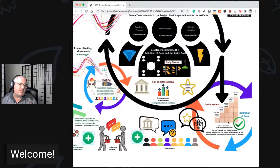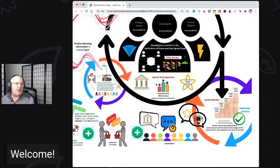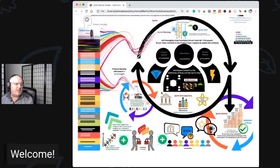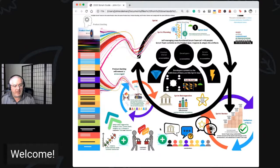Regarding improvements from the retrospective, the 2017 guide expected at least one improvement action in the next sprint backlog, but 2020 relaxed that — maybe you do some improvements straight away, like a new team agreement, system modeling, or reviewing Scrum values. For the first time in the 2020 guide we see the words 'customer' and 'end users' explicitly, which is a big welcome for me. Stakeholders implicitly includes customers and end users, but it's nice to see it made explicit.